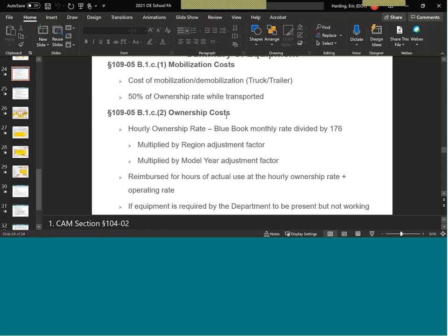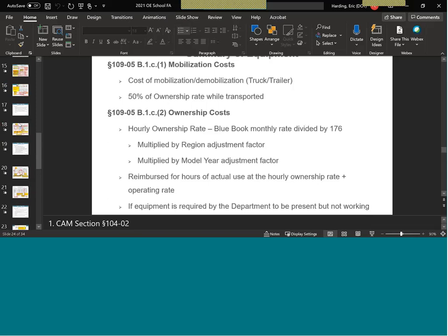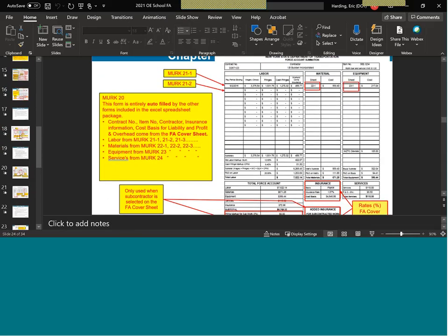It will take into account the weekly limitation of the workers' comp if your dailies are entered properly into your weekly summaries. That is correct. So if it's piecemeal work, they may never reach a limitation that would cut off the workers' comp calculation, because it's based on the number of hours in a week that a worker works, not the number of hours on a force account.